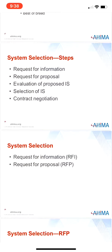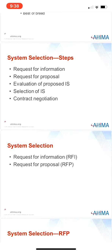The healthcare facility must identify what they demand from an information system, such as specific functions and compatibility with existing information systems. There are a number of steps in the system selection process: number one, a request for information and a request for proposal; two, evaluation of the proposed information system; three, selection of an information system; and four, contract negotiation.